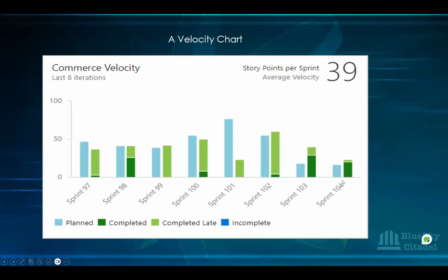What capacity completed it? The whole sprint, the whole team, full capacity, half capacity will determine. Yeah. And these are some of the things you want to keep track of also as a Scrum Master. Checking the velocity as they go ahead to say, okay, I've noticed that at least for the past 3 sprints, nobody went on holiday, and the average velocity has been so. You note that, and then you're able to use that to negotiate when the time comes with the product owner or even with the team themselves.